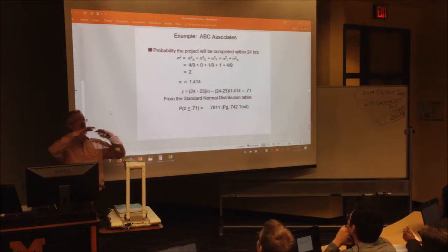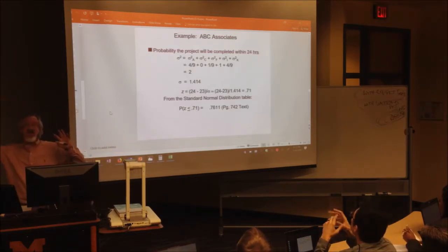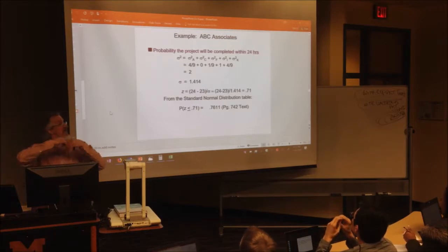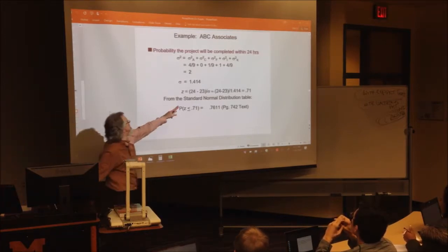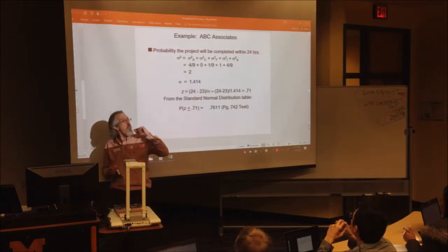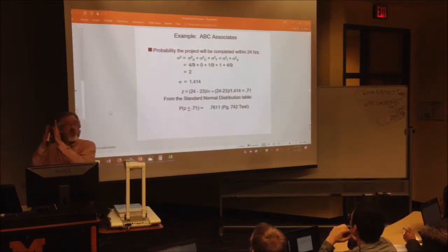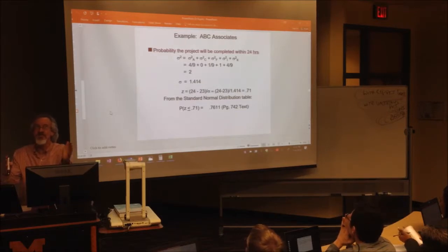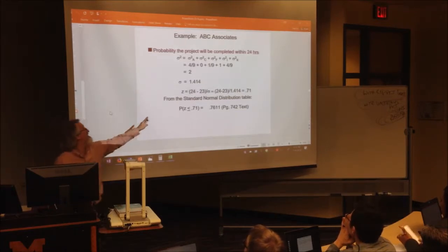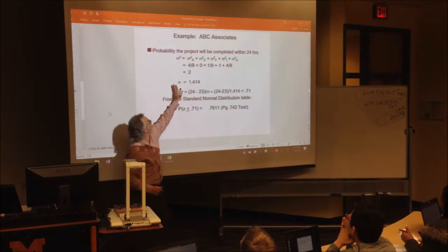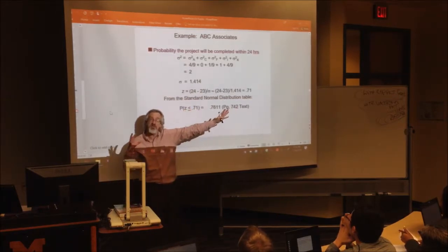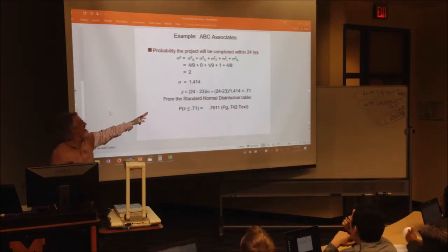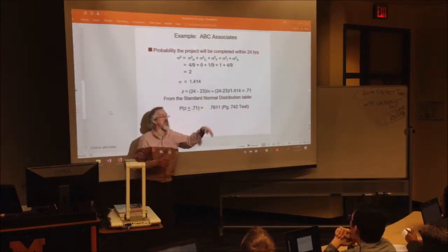You're going to do this whole thing to figure out what the expected amount of time to get this project done in. And then you're going to be asked a question, hey, that project's supposed to take 23 units of time, but what is the probability that you will for sure get it done in 24 units of time or less? And then you've got to calculate the Z. You're going to learn how to find the standard deviation of the project through the critical path. I'm using a lot of words you're going to learn. And you calculate your Z, then you look up your Z in the back of the book.